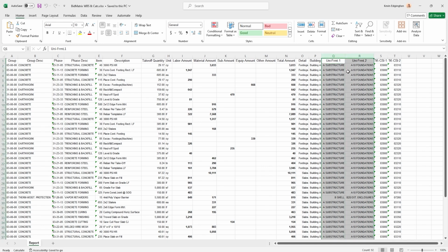And then if you think about MasterFormat, all my divisions here, like 31 for earthwork. But if I think back to the older '95 CSI list, that would actually be associated with division 2 for site work and so forth. So maybe I've got a job that I want to be able to see by the 48 divisions or the 16 divisions and so forth. So like I said, just more information. You can have an indefinite number of columns to bring in.